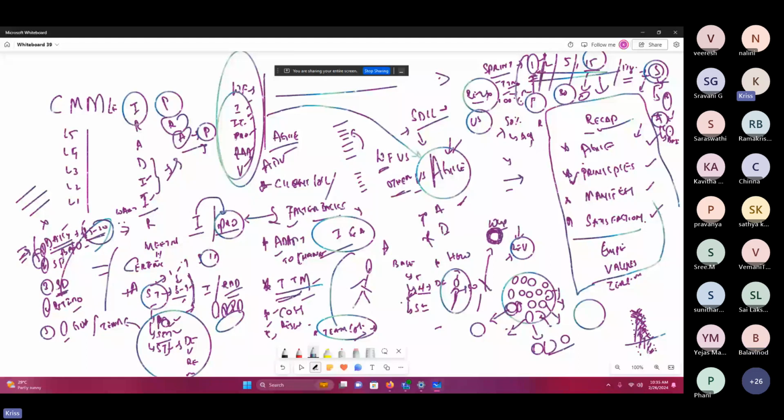For doing this, this much time you need to spend, and this is specific to the Scrum team. Sprint planning is also specific to the sprint, and we need to spend around 2 to 3 hours on it. And sprint demonstration is 2 hours. This can be public, because the sprint demo comes at the end, when they have completed that particular sprint and want to expose it to the external world. When they give this sprint demonstration, it would be given to the entire world, saying, hey, we have achieved this goal.